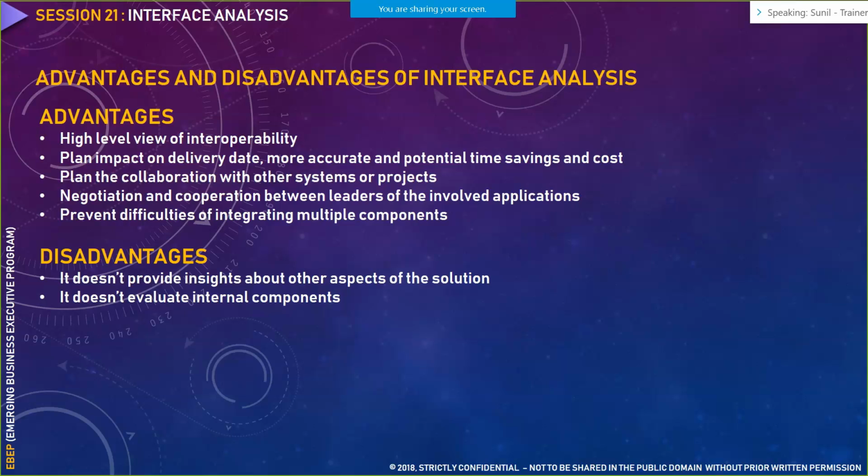Now we waited for 2 weeks and the system was not up by that time. So ultimately it took them 2 months to fix and bring their system back into business. Until then, we were just waiting for their system to be up so that we could start consuming their services to issue policy. So these are some of the disadvantages that are associated when you are dealing with an interface. Of course, it saves you cost, but everything comes at a price. If their system is down, you cannot do anything because ultimately we are just consuming their services.